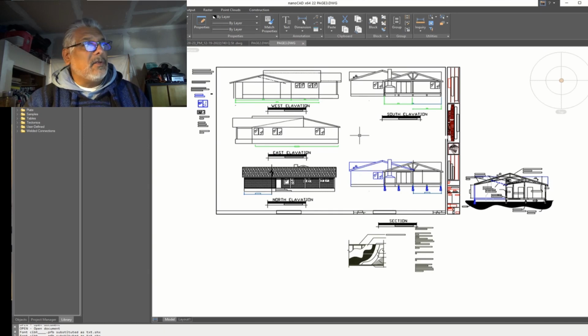So I take my drawings to a civil engineer, and then he creates a set or a sheet of calcs with some details showing his requirements for this building, and then stamps it, and I add that to my sheet, and then run them over to the city or county, wherever the job is, and run them through plan check, and we have to go through the process of making corrections.